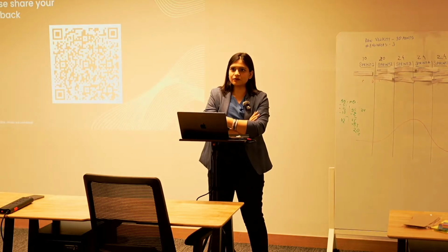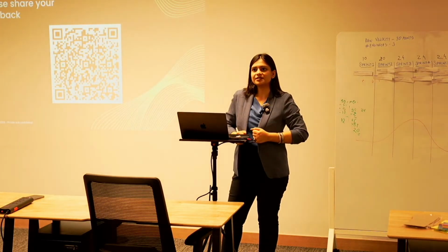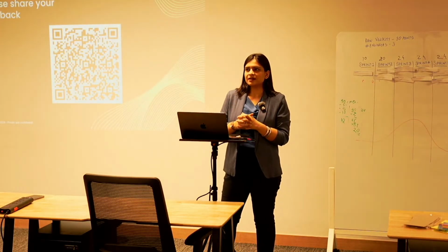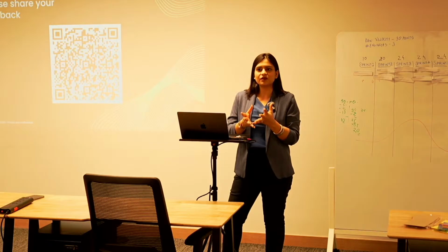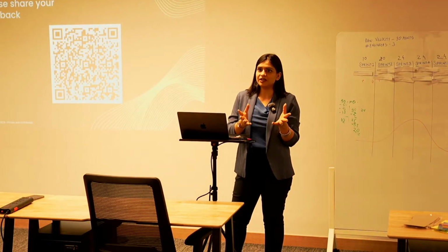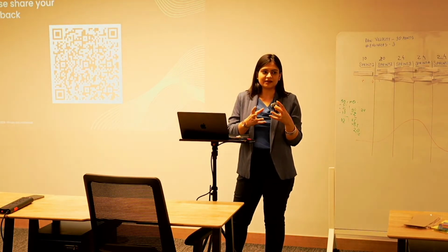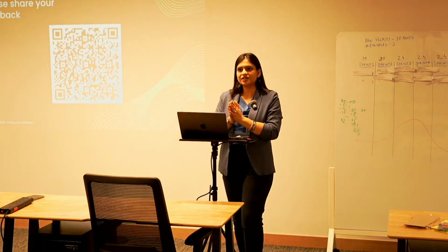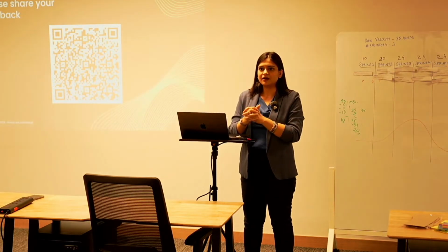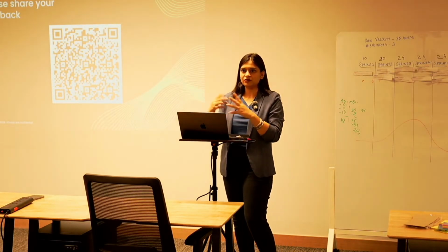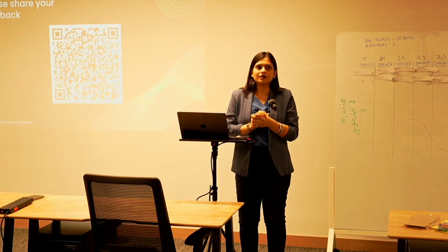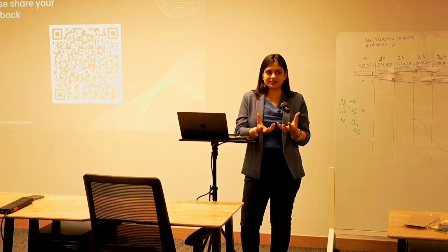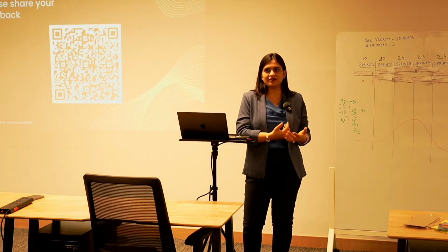So there are two things. One is that if the team is mature, they understand that quality is important and needs to be baked into the estimates that we are giving. That comes from defining a solid DOD. If you have the right definition of done, then in that we say that it has to be deployed to staging and it has to be sanity tested, or maybe even an automation flow written for that. If that is there, you'll already have a team that understands that the estimates need to go into the stories while we are estimating them.